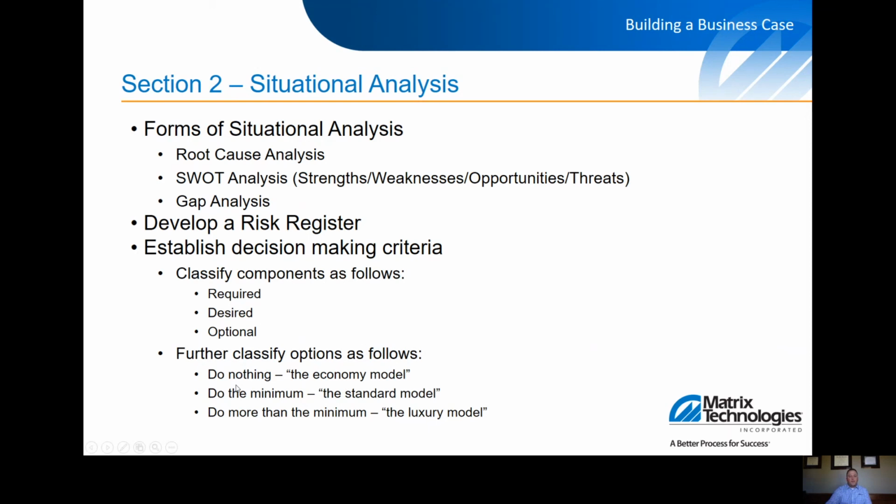Situational analysis allows for components to be classified as required, optional, or desired. This further qualifies needs versus wants and adds to the objectivity of the business case. Be sure to capture all of the options that are identified to ensure that all avenues have been considered and vetted in this process.